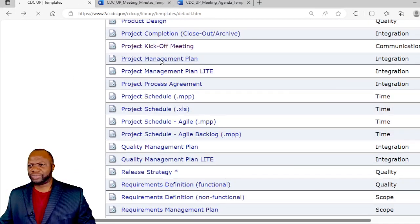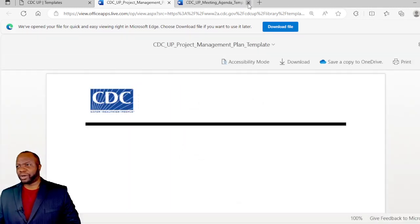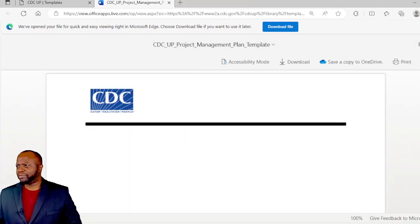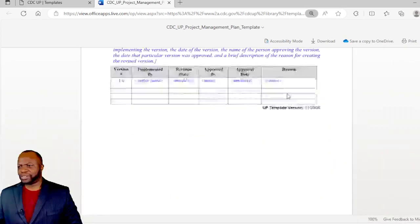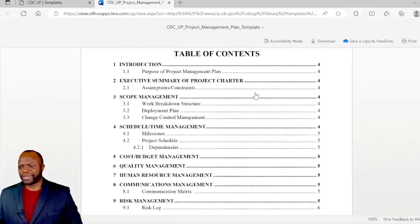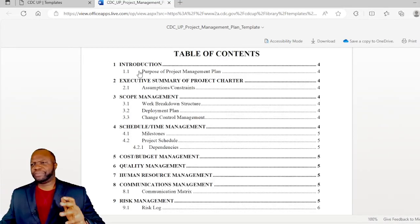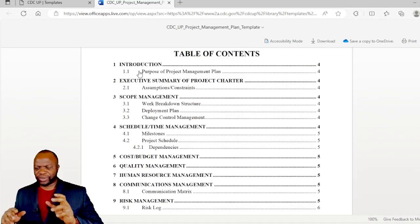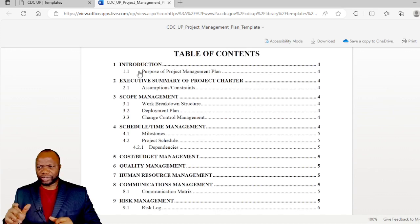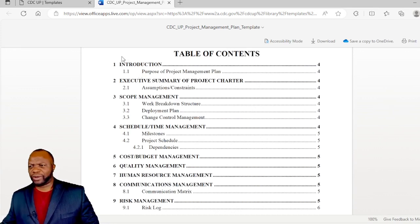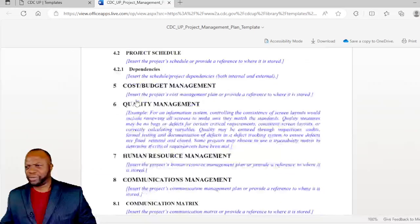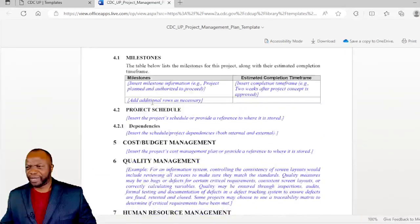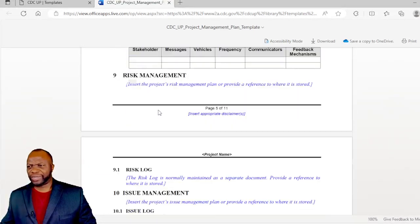A lot of times PMs are not into the detail about kickoff meetings, but here you can see the CDC have provided some really good itemized thoughts for how you can run this kickoff meeting. Moving back, we've got the project management plan. By far the most popular project document, for lack of a better word, or project artifact. Here we can see in the table of contents what exactly this is. The project management plan brings everything together. We've got schedule, cost, scope, risk, procurement, stakeholder, all the areas, all itemized, and all you do is go to the area and make sure you populate it accordingly.